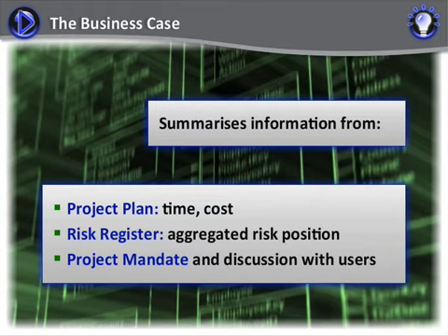If you think about it, you'll see that as the project proceeds, the forecast timescales may change, costs may change, risks may change, and so on. These changes must be reflected in the business case. It may be that changes to costs, for example, during the project mean that the business justification no longer stacks up. That needs to be spotted and acted upon.